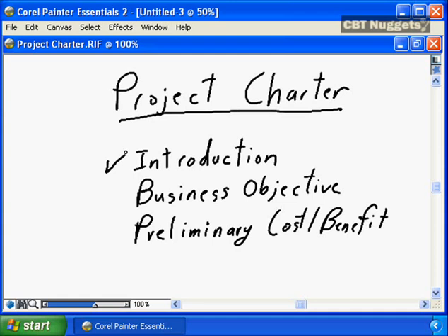You need to ensure that the project charter is well written, and probably most importantly, that this introduction, this executive summary, is very powerful and very complete, in 1 to 2 pages, outlining everything about the business requirements and everything about the project, to ensure that it receives the attention of senior management and the approval it needs to proceed to the next stage, which is planning.